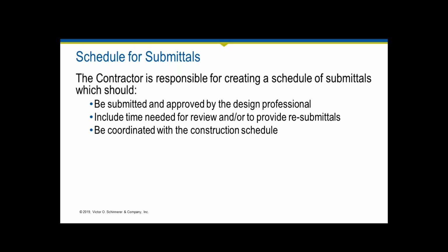So insisting on a schedule of submittals from the contractor is often required. It's often required in their documents, but you need to insist that they give you a schedule so that you can plan accordingly. And you need time for review, not just the initial submittal, but oftentimes there's a resubmittal process, and you need adequate time for that, and make sure that you are charging for that, whether it be lump sum based on your assumptions or on a time basis.